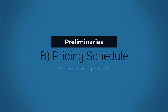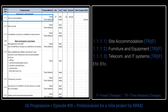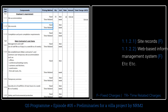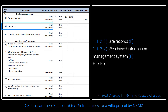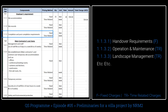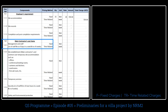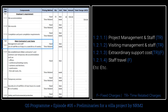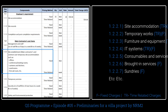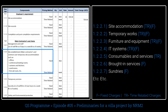The pricing schedule is divided into two major parts: preliminaries requirement and main contractor cost items. The first item is site accommodation, which includes furniture, equipment, telecommunication, and IT systems — with fixed and time-related charges. The second is site records, which includes a web-based information management system. The third is completion and post-completion requirements. Management and staff also have fixed and time-related costs.